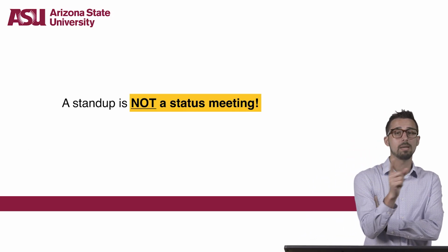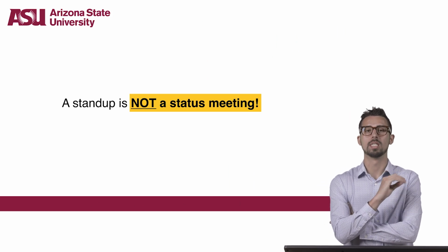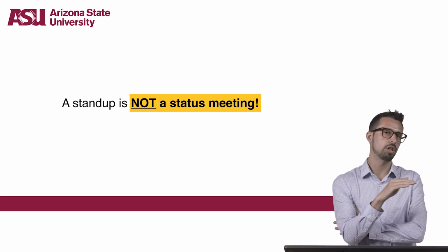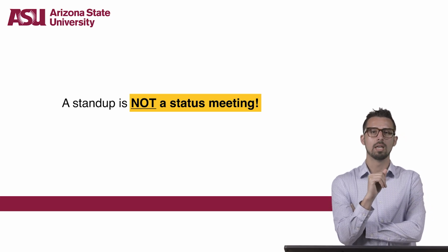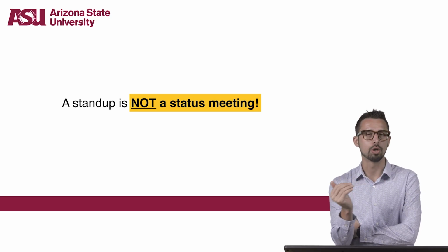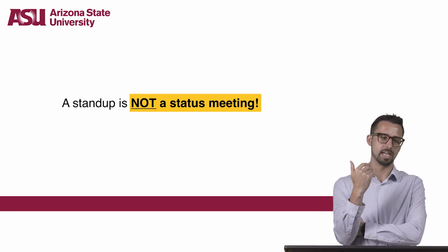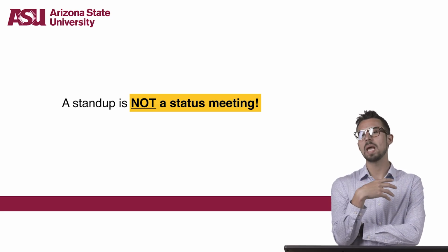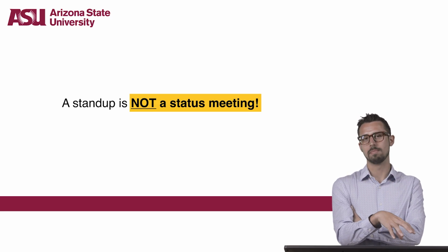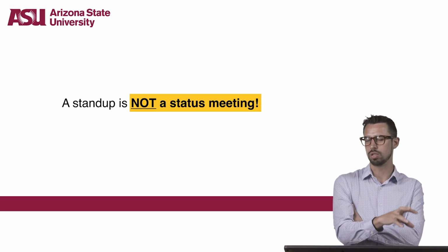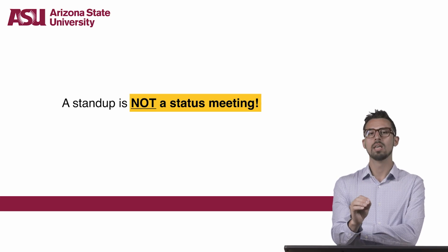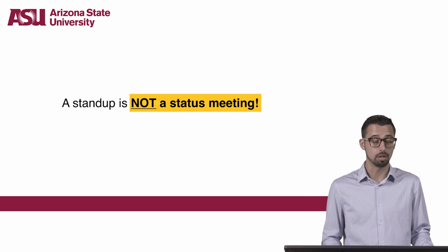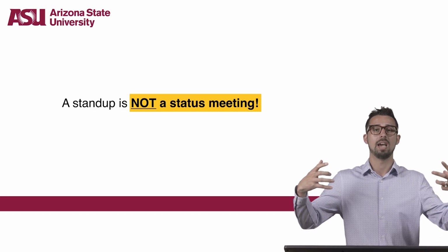One of the anti-patterns that is typically seen in stand-ups is that they become status meetings. Teams who have traditionally worked in a predictive environment, something more sequential like a waterfall plan or waterfall method, may tend to fall into this anti-pattern since they're a little bit more used to providing statuses.